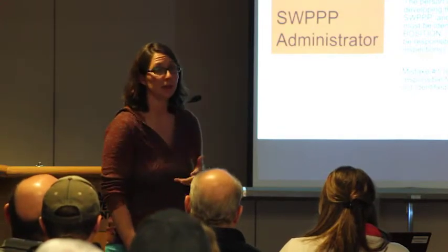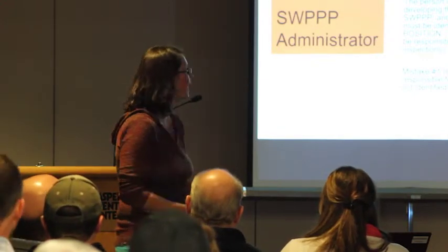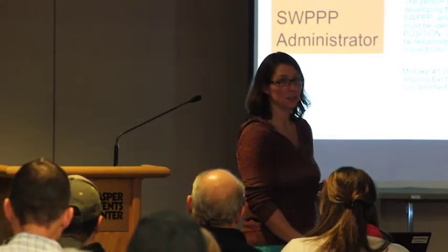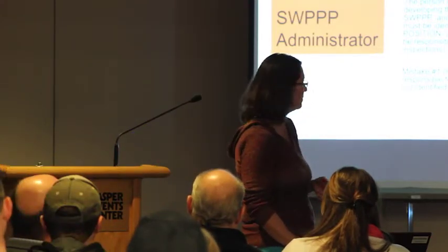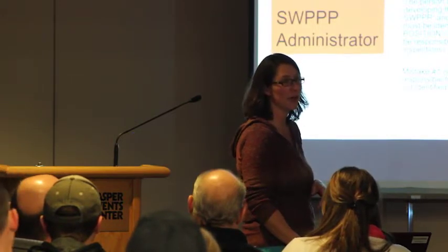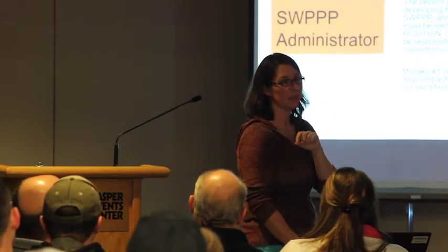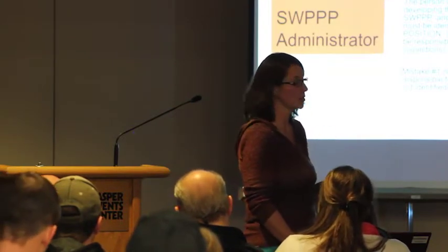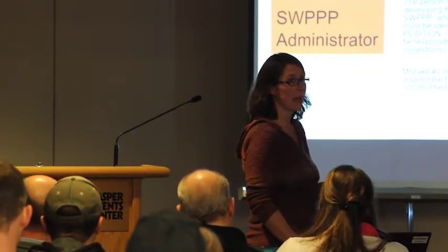Like we said, one of the big mistakes is either not identifying the people in your SWIP, or assigning duties to people who haven't been identified to do those duties, either by job description or name. And it's your choice. You don't have to assign a name to it. You can say this job title, whoever's filling this job title, as long as they have a good idea of the SWIP, they're going to be conducting inspections. That's fine. It doesn't have to be by name.